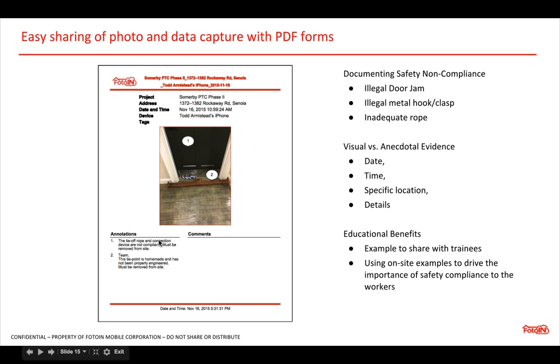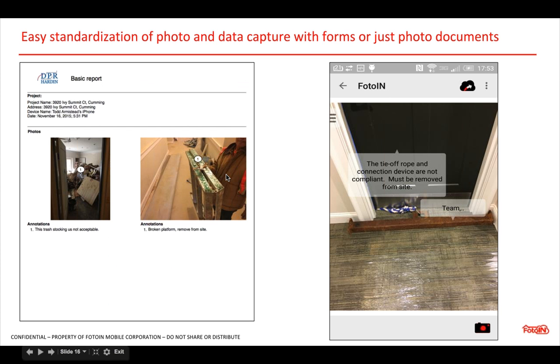This is what Todd would do with photo in, basically document what's going on, but then he would actually leverage this photo in either a report fashion or really as just a photo document to actually share either with that crew or with their foreman, or leverage for purposes downstream. Basically later he has a whole library of these photos where he can use them for training and educating workers what's acceptable, what's not.